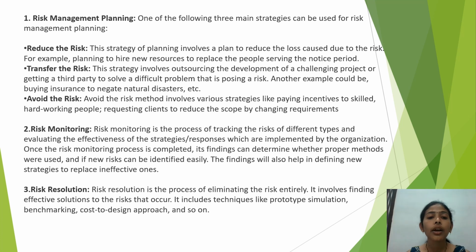Once the risk monitoring process is completed, its findings can determine whether proper methods were used and if new risks can be identified easily. The findings will also help in defining new strategies to replace ineffective ones. Third one, risk resolution. Risk resolution is the process of eliminating the risk entirely. It involves finding effective solutions to the risks that occur. It includes techniques like prototypes, simulation, benchmarking, cost to design approach, and so on.